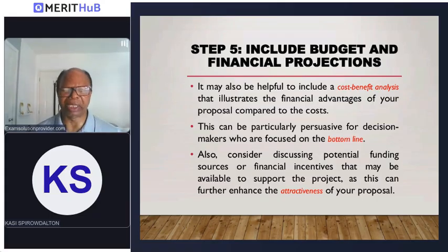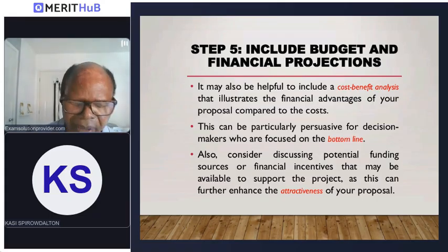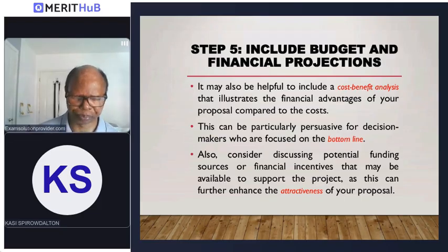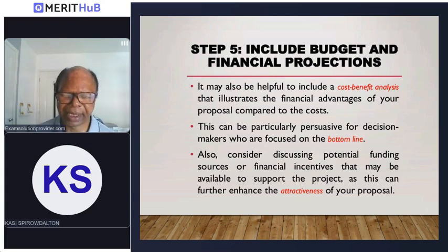So this is the money we're going to spend, and this is the number of people we are going to cover with this money. So you need to look at the total cost divided by the total number of people. That's what the cost benefit ratio is. How many people are going to actually access and use these services? That's what is important to the government.